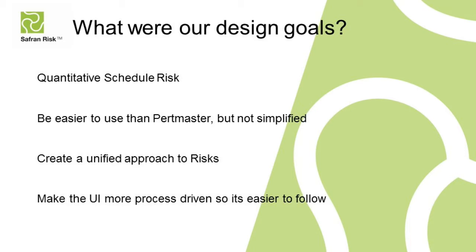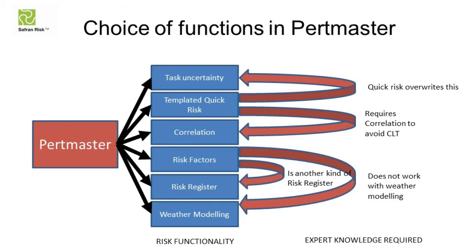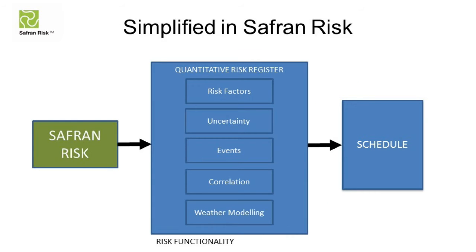What I mean by that is, for example, in PertMaster you had all these potentially conflicting ideas, like risk factors. In Saffron Risk, there is just one quantitative risk register, and that contains all of the risks and uncertainty — events, factors, weather modelling, correlation. It's all defined in one place, which makes it a much more coherent and, I guess, a grown-up way of looking at the problem.